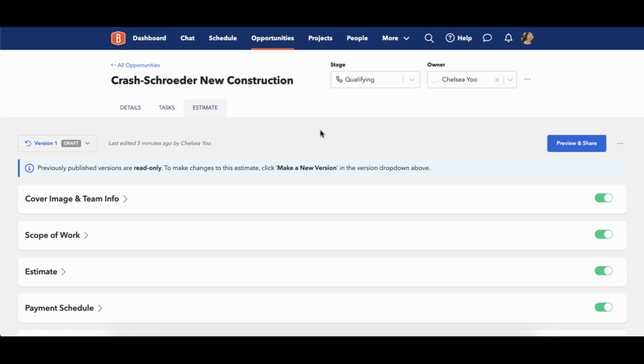One of the things I like to say kind of right off the bat is that as far as estimates go, they're not designed to sync with projects. So if you change something in an estimate, you create a new version, you do anything like that, it is not going to touch anything within the project. So if you've already converted an approved estimate over to a project and then you go in here and you start changing things, it's not going to carry over to the project and vice versa. If you start changing things in the project budget, it's not going to carry over to the estimate and they're not designed to. The estimate is kind of designed to be almost like your baseline, whereas the projects is where you're really going to get into the nitty gritty of the things that the client was needing.